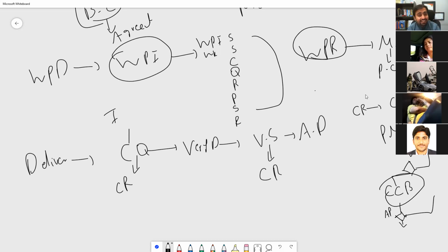Very important: in Agile, if there is a change, we harness change. So we always accept the change from the customer, the product owner. There is no change control board here. The product owner accepts the change, puts it in the form of a user story in the product backlog, and reprioritizes the backlog. He puts the change in accordingly. So that's how change works in Agile.